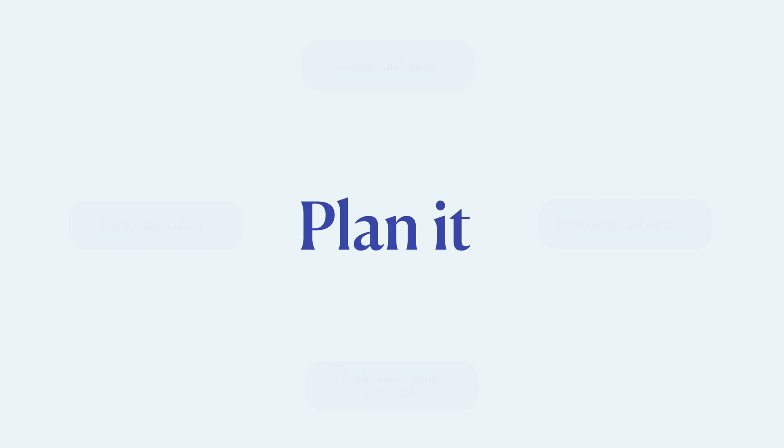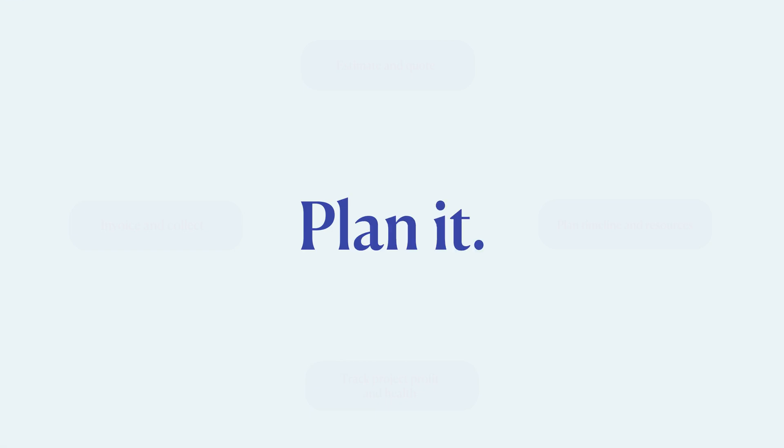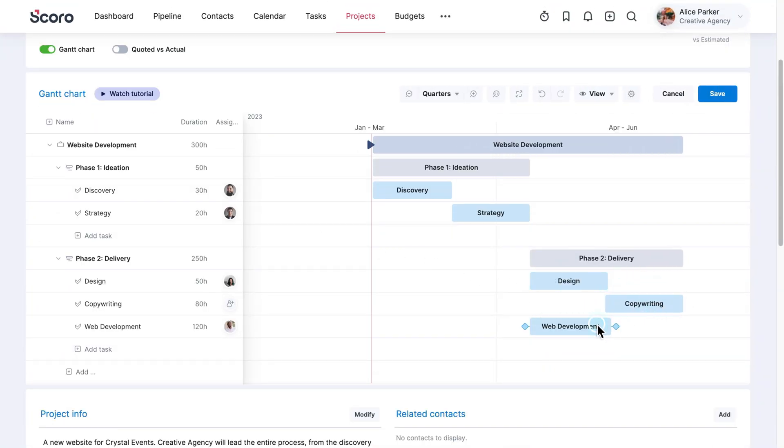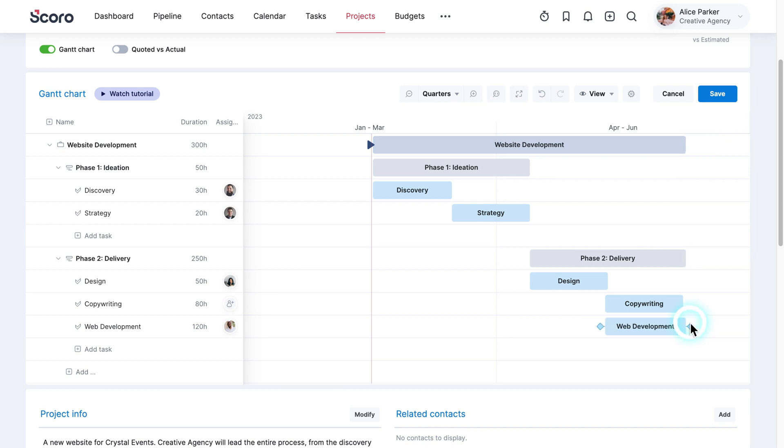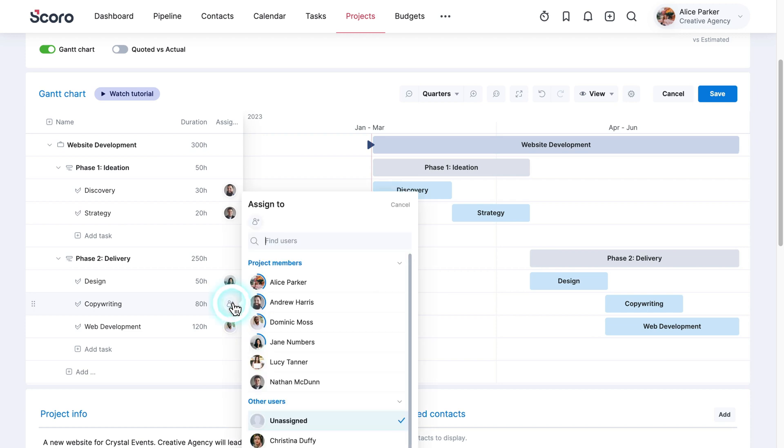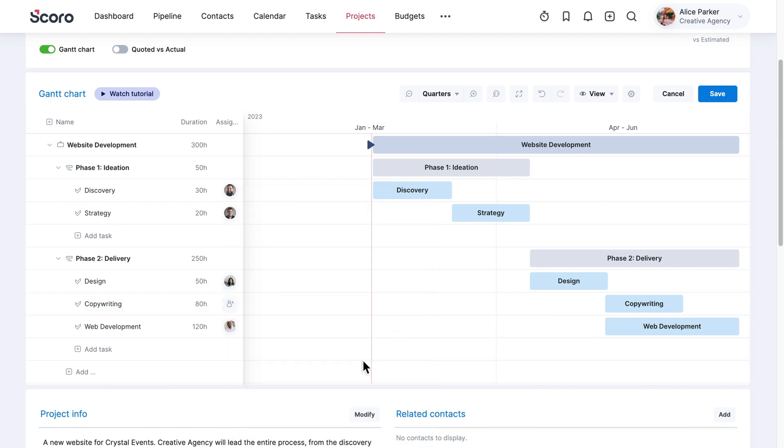Plan It. You can use the Gantt chart to plan the project delivery timeline. Assign tasks in the same view based on team member availability. This way, you can be sure everyone has the capacity to complete the project within the estimated timeline.